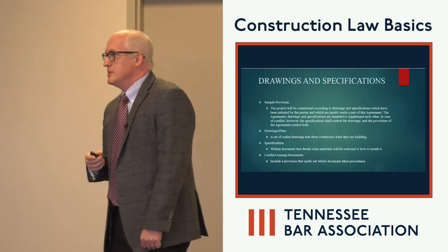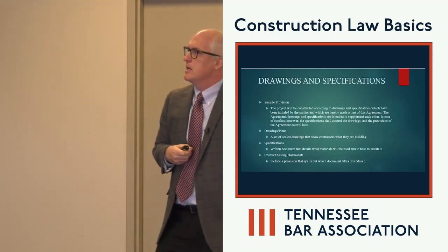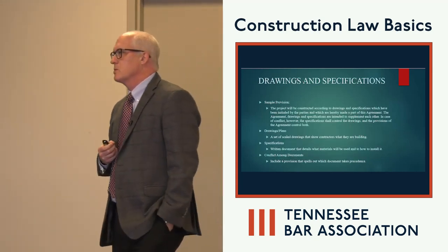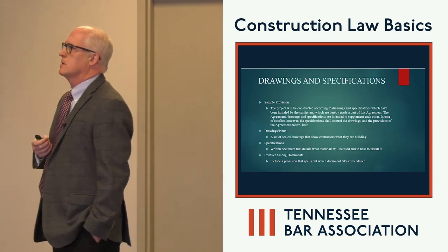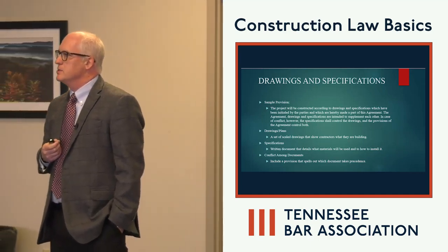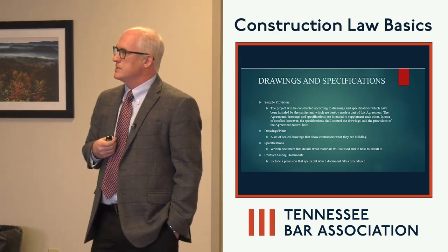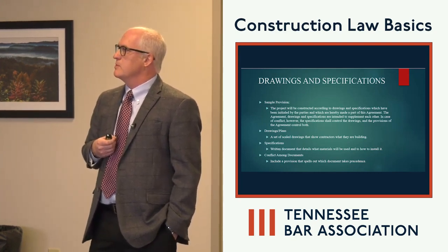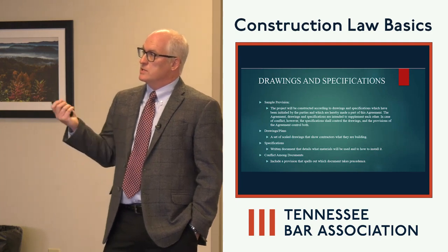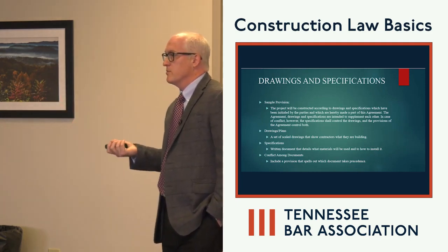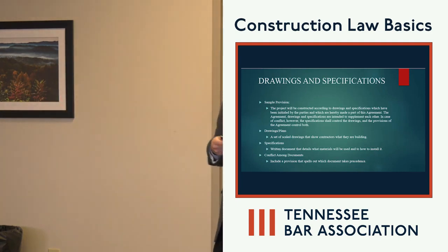Drawings and specifications, again, sample provision. This project will be construed according to drawing specifications which have been initialed by the parties and which are hereby made a part of this agreement. This agreement, drawing specifications are intended to supplement each other. In case of conflict, however, the specifications shall control the drawings and the provisions of the agreement shall control both.